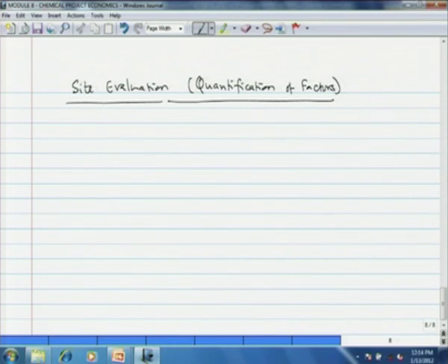They can have dialogues with the local existing industries. From their experience they can gather information about the site deficiencies. Then there could be local hostility towards the chemical project. Therefore, the team has to interact with the local civic bodies. And in this process they can shortlist some of the sites.